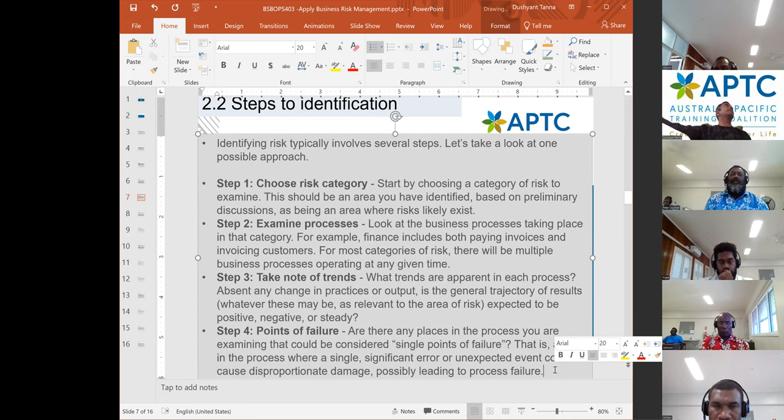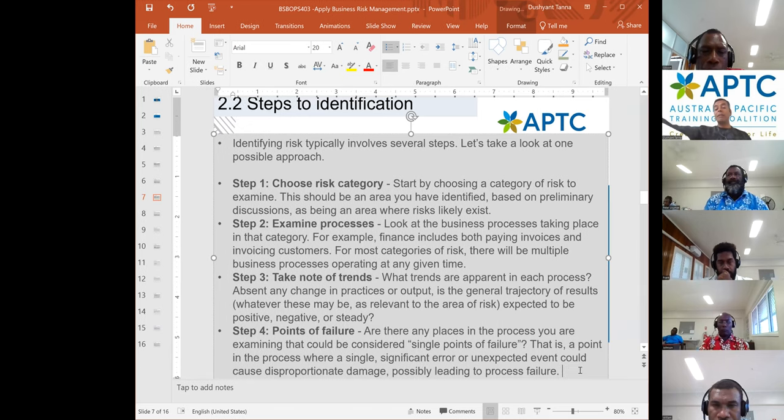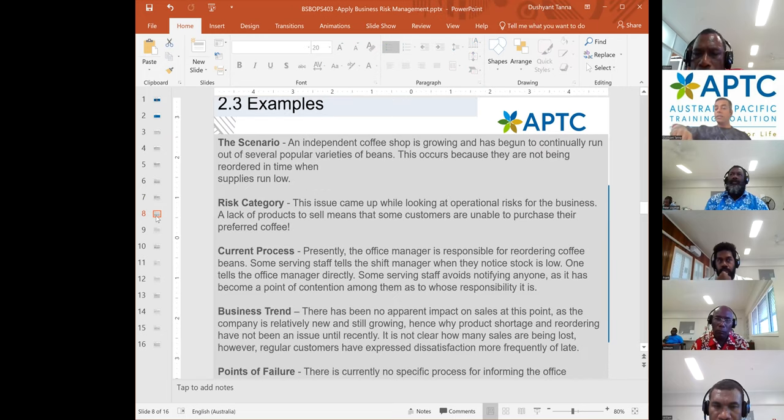Another one is, let's talk about yesterday's scenario where we were considering starting the new restaurant. You need tables, right? Since in the past you didn't pay a few of the logistics people on time, everyone had an impression that so-and-so company doesn't pay on time. That means you don't get decent tables or furniture for the opening of the restaurant. No one is ready to supply you goods. Without tables, you cannot open the restaurant. What will you do? One single thing can ruin the whole project. All clear so far?